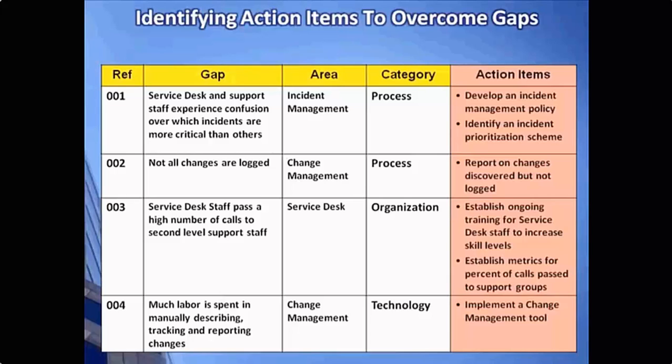Note that it's reasonable to identify more than one action item to address a finding, if that makes sense. So it's okay to have multiple action items to address each gap, as you see in this example. Also note that you can reuse action items for multiple gaps. An action item that you take to fix one gap may also be just as useful to fix another gap that you see out there.